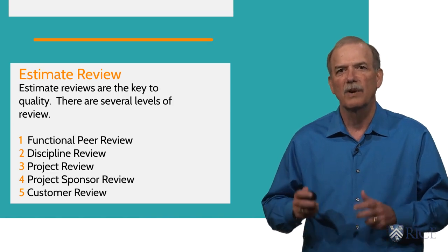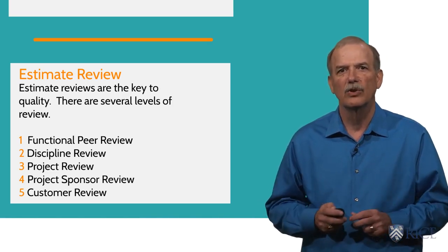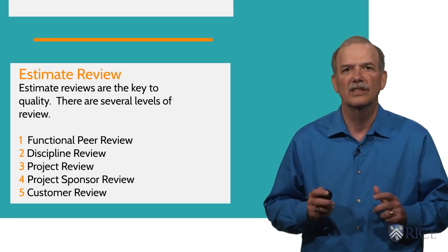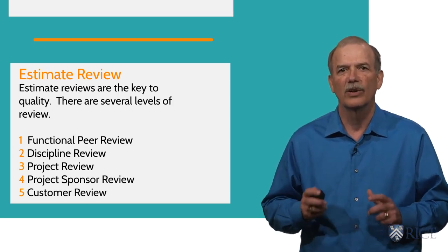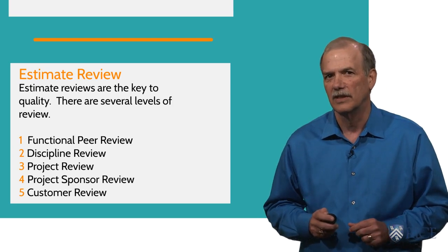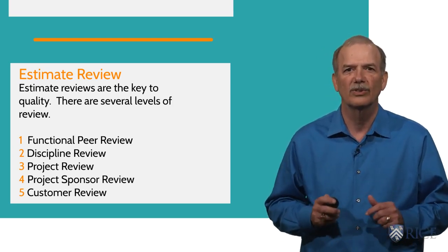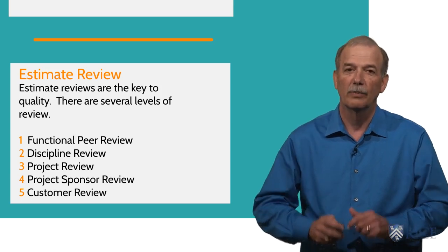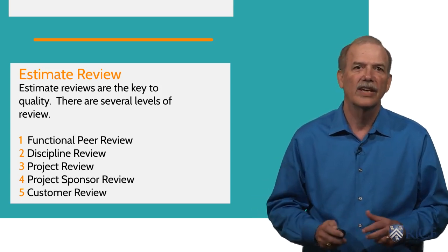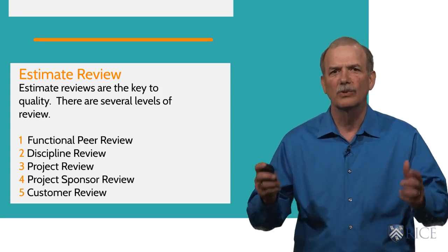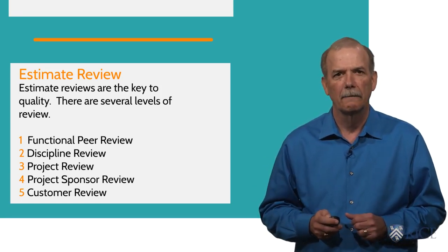We need a project sponsor review. This is a review with the project sponsors to obtain their endorsement and confirm consistency with the project charter and the organizational strategy for estimates. The project sponsor review also brings the resources of the organization to bear. Is there a better way to do this? Are there changes in the market that may impact the project? Can we get the resources we need to complete the project?